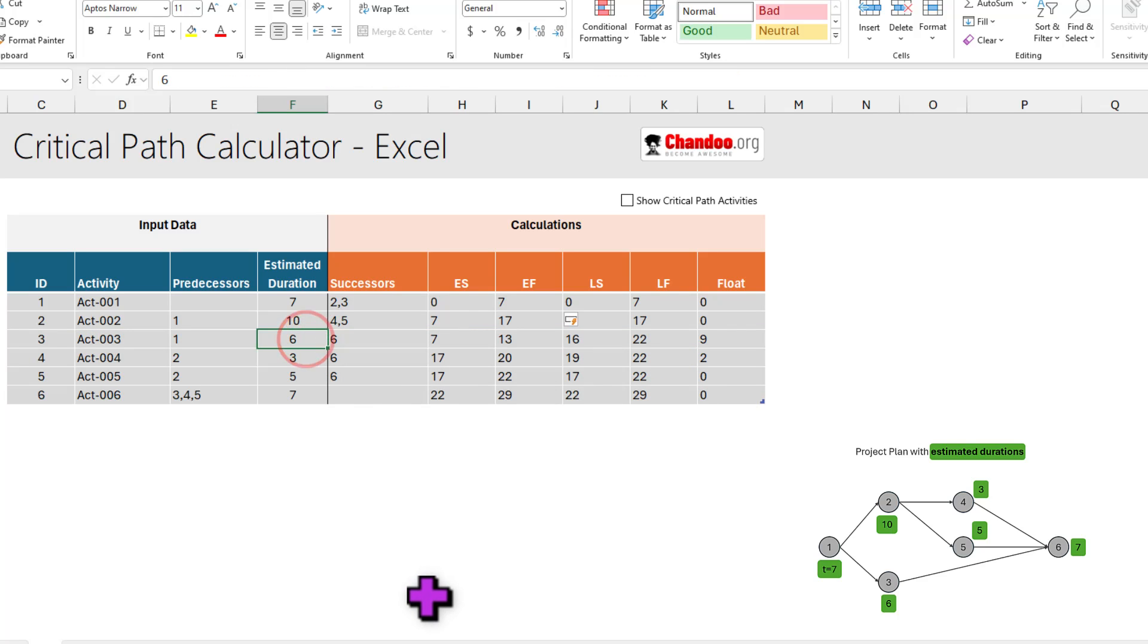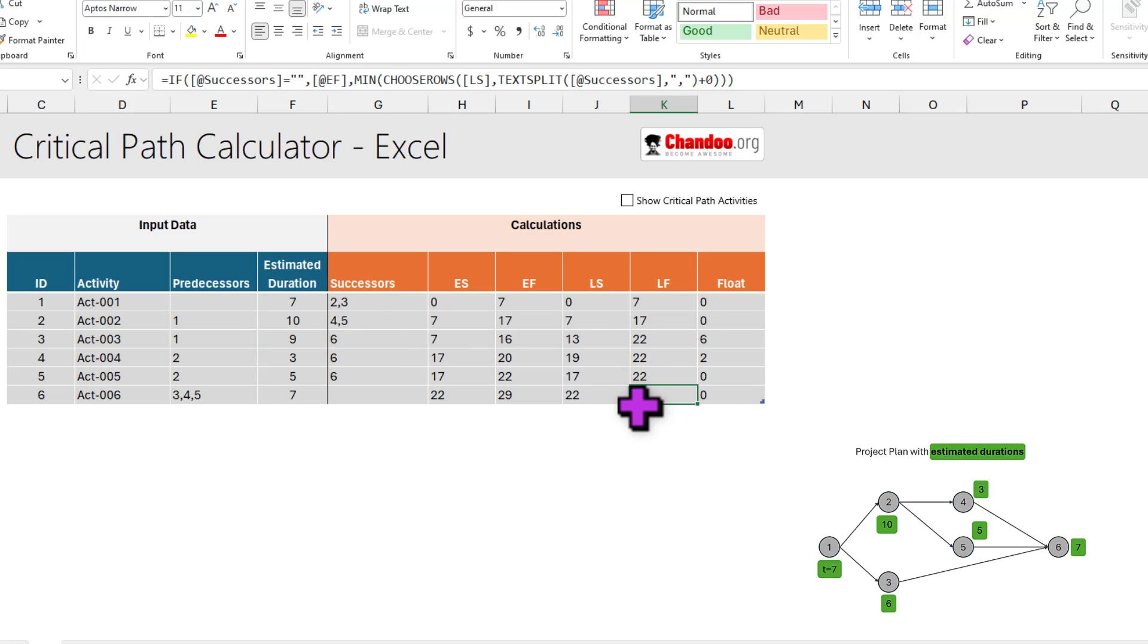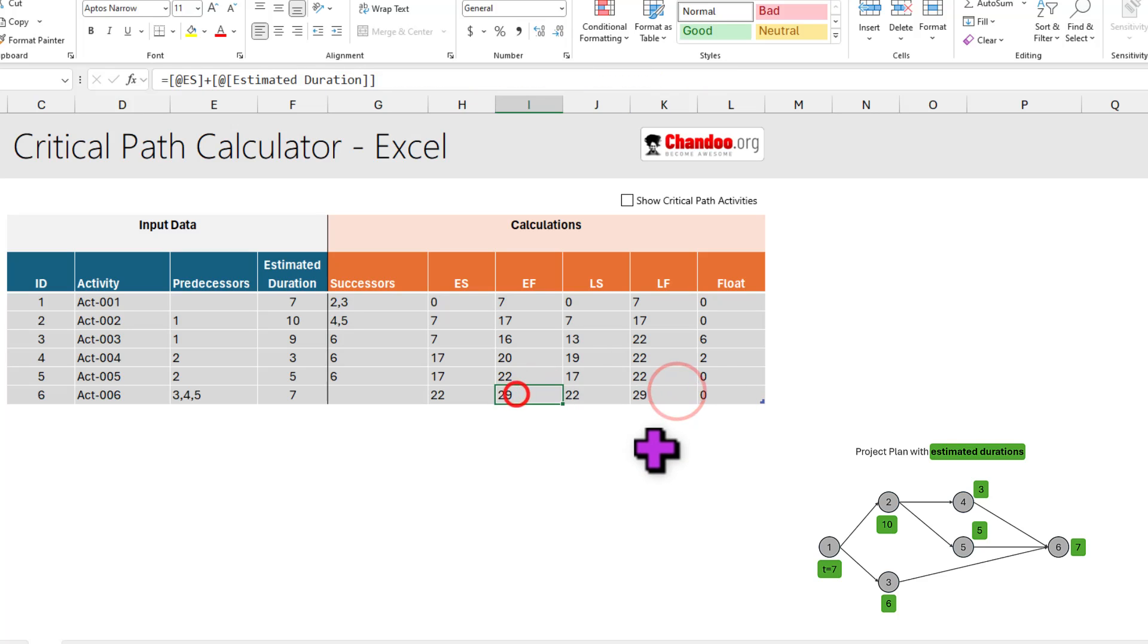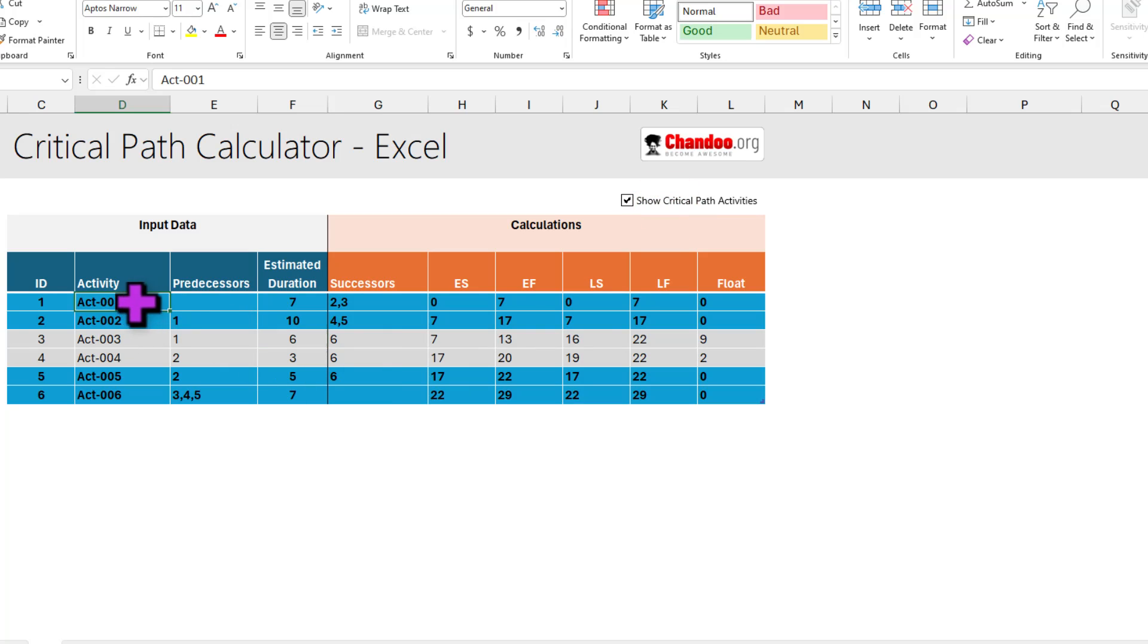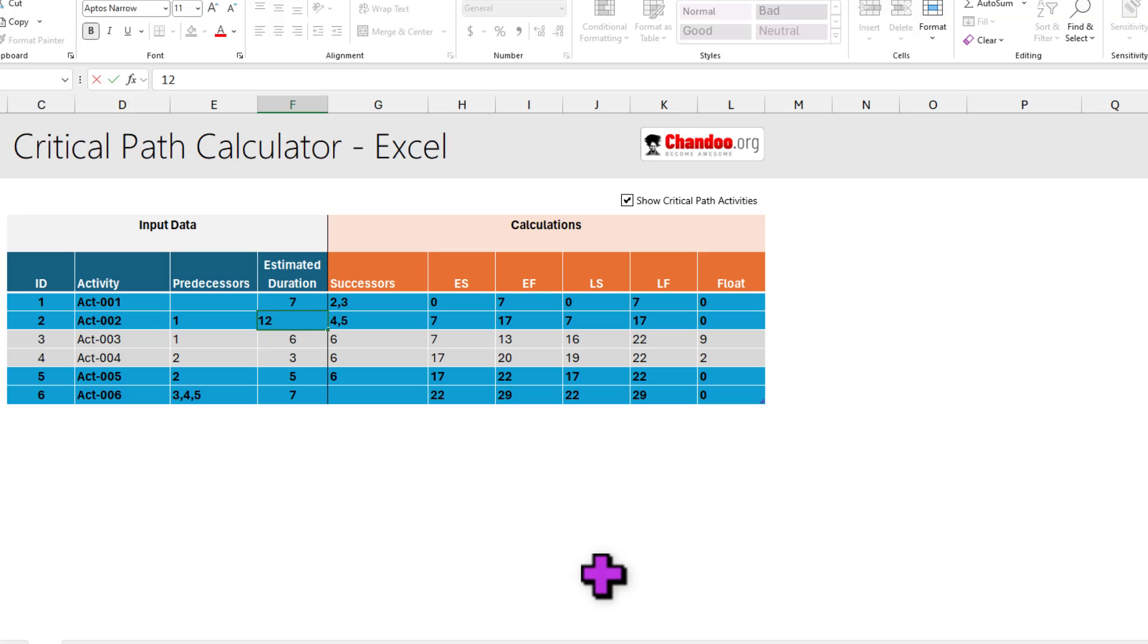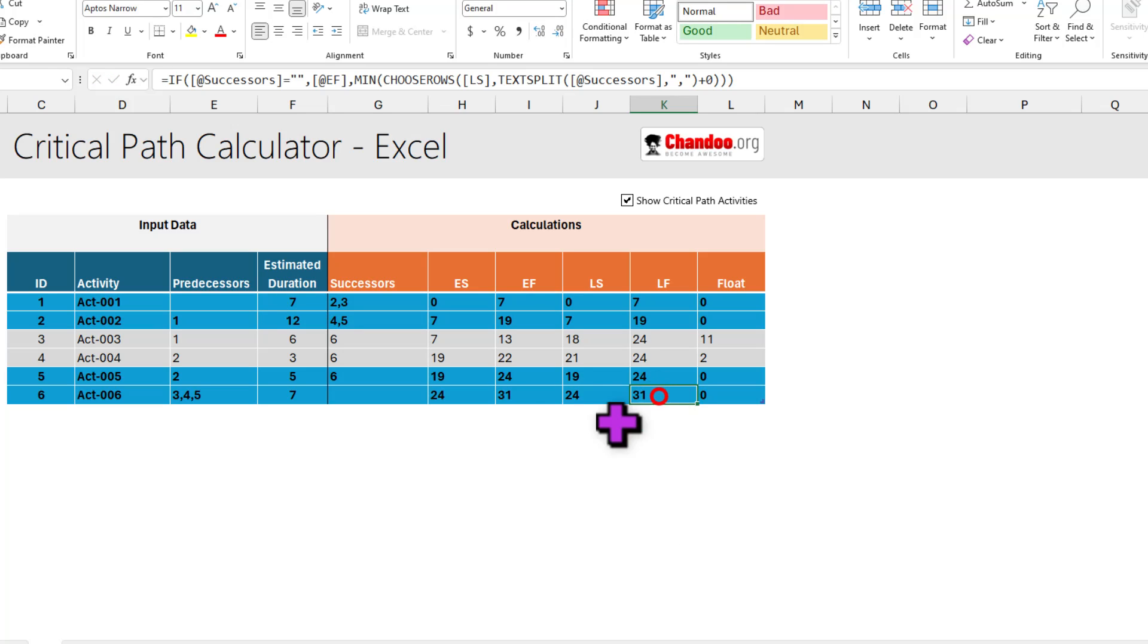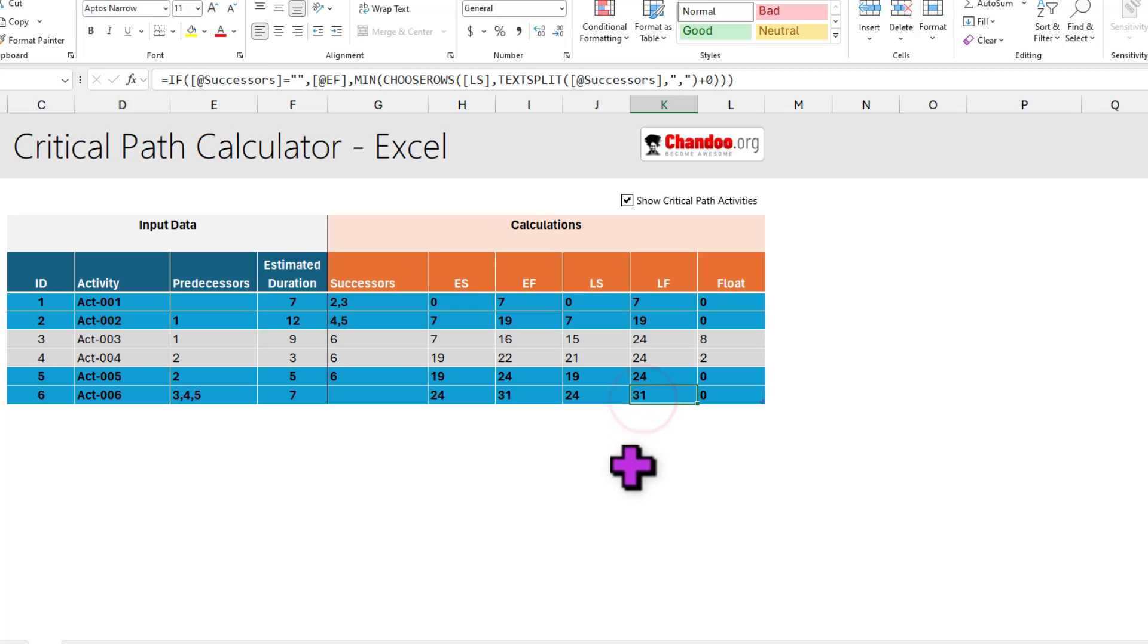Likewise, if activity three, for whatever reason, the amount of work you have estimated is not six days, it takes more than six days, so it takes nine days. Notice that even when I change this to nine, my latest finish time and earliest finish time do not change. I'll still be able to deliver my project on day 29. Now let's see what happens when one of the activities on critical path changes. So for this, I'll highlight that. So you can see that one, two, five, and six are on critical path. And let's say critical path activity number two, we estimated it to take 10 days, but it actually took 12 days. You can see that this will have an impact on the overall duration of the project. Whereas activity three, if I change this to nine days, it wouldn't have an impact on the overall duration of my project.